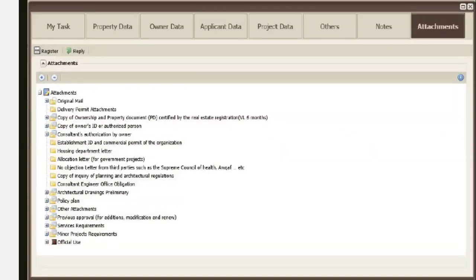Once you complete it, you will go for the attachments, attaching all the drawings required, and they have to be in AutoCAD format. We'll see the formats for the application, how it will be considered, how to prepare it, and what level of details we have to prepare and submit. And put the attachments for all disciplines, starting from the architect, to all the applications, letters, undertaking letters, PIN numbers, policy plans, architectural plans, and the MEP services as well.